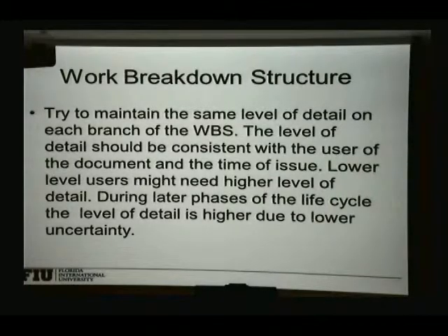Yeah, you put it into your unit cost. You say, okay, I'm going to have 500 doors. And if you know that you're getting a discount for volume, then you should use your discounted value. So the first thing I need to do is do my takeoff, get my quantity, then figure out what my cost is, plug in the cost, and then it populates through. Correct. Exactly right. That's exactly the way it's going to work.